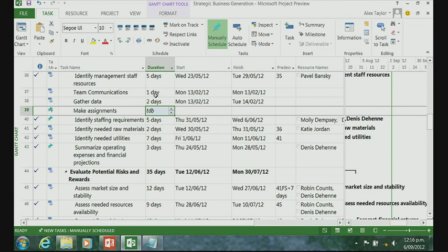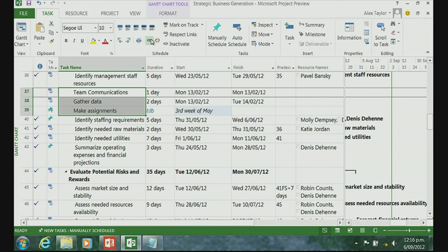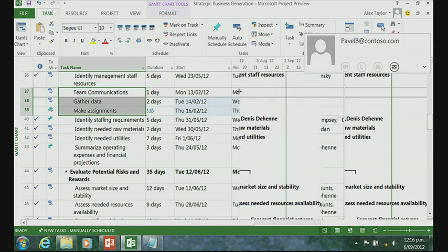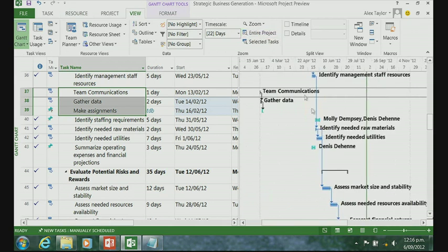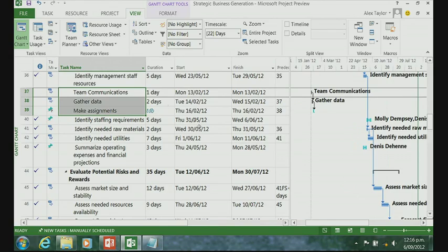And then the other thing I can do is go and do the same thing here. So this one's actually going to be scheduled for the 3rd week of May. So I'm in the past a little bit, but that's okay. Each of those needs to be done after the other one, so I'm just going to link them together. Now I'll just move this across so you can see on the Gantt chart the new tasks I've got in there. All right, so you can already see some of the change highlighting until I move things around.